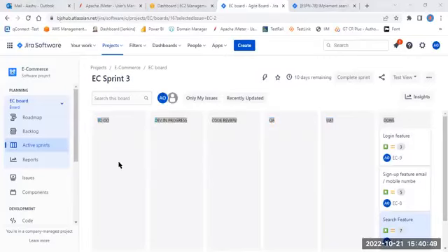As of now, just try to understand Dev In Progress. Development has started the work. Once they complete it, their code is reviewed by the team leads. Once the team leads review the code and everything looks good, they give it to the QA team, who perform testing. If QA says everything looks good, it moves into UAT, where as user acceptance testing, the client can perform some testing. Then finally we move into the Done status. Done means the story implementation has been completed, meaning we have developed all three functionalities. Getting my point? At the sprint last date, all the stories should be in Done status. That is our expectation. Clear, guys?